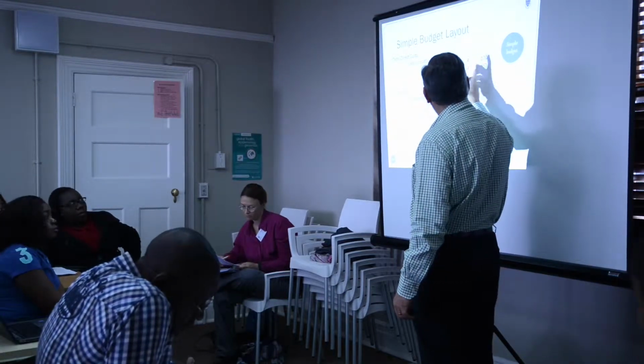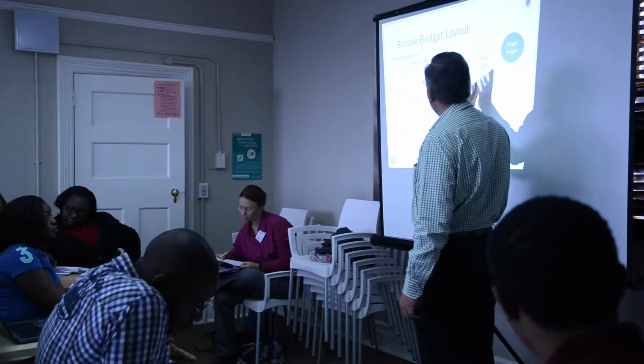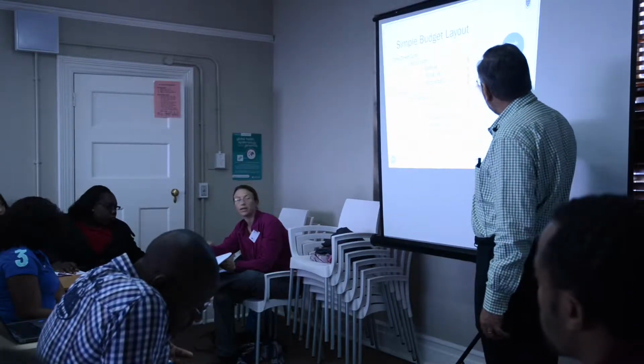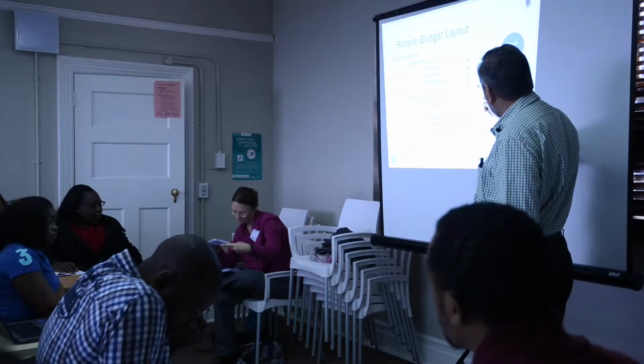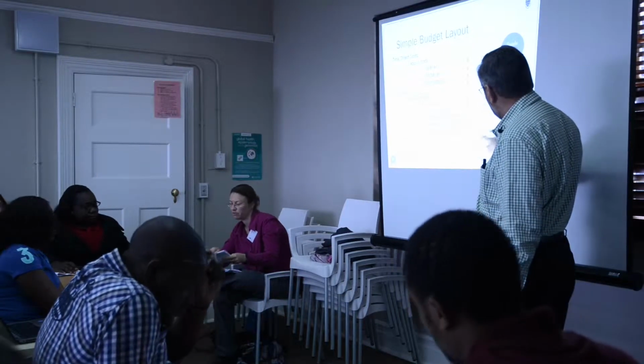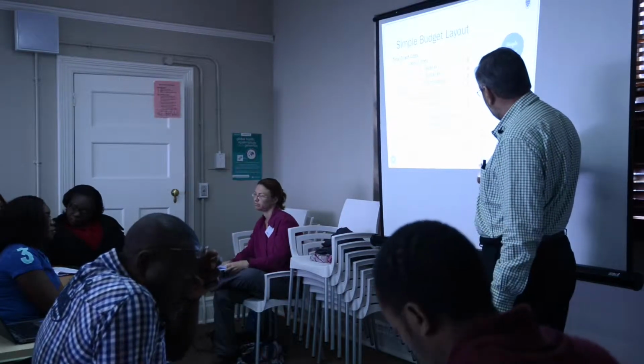All right? And what I do is salaries, 100, bursaries, 150. Don't worry about the numbers. For now, we're just using simple little numbers. And I add up the labor costs. I add up the operating costs. I add up the capital. And then I get a thing called the total direct cost.